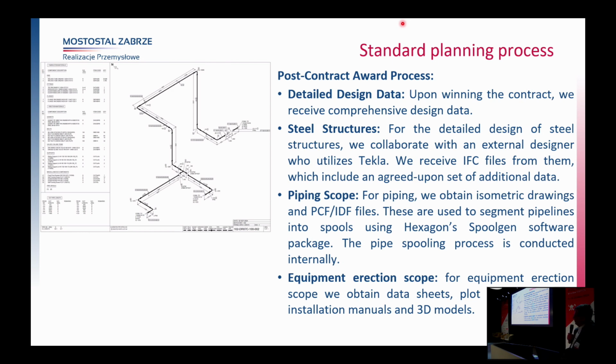And this is done internally, the whole spooling process. Erection equipment is a different topic, because usually there are some drawings, some erection manuals and other things, and the 3D model is just to judge if we can fit inside the area where the equipment needs to be installed, or if we have to think about some special solutions.